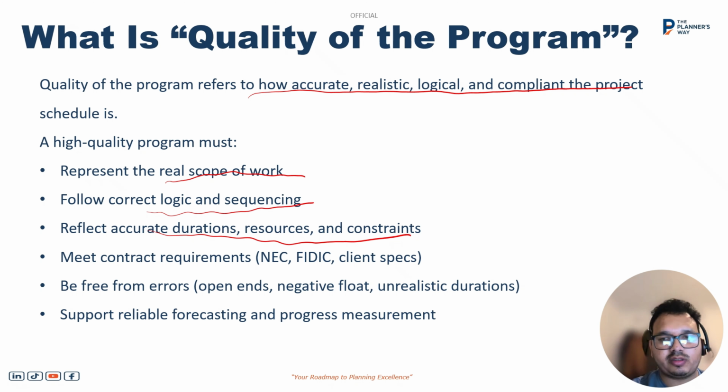It should meet the contract compliance, so NEC contract or FIDIC, or whichever contract it is. It should not have any open-ended activities or negative float or unrealistic duration, and it should support realistic forecast and progress measurement. So these are the requirements for a high quality program.